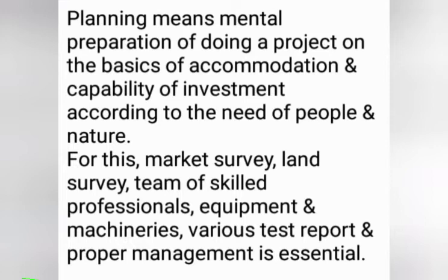Planning depends on how much land and finance we have, or it may be a work order of a project given. There we have to get drawings, bill of quantities, etc. We must know where we get the resources. Also, we have to study and understand the mode of contact with the owner. Before starting a project, limitations of responsibility are to be judged in the planning stage.